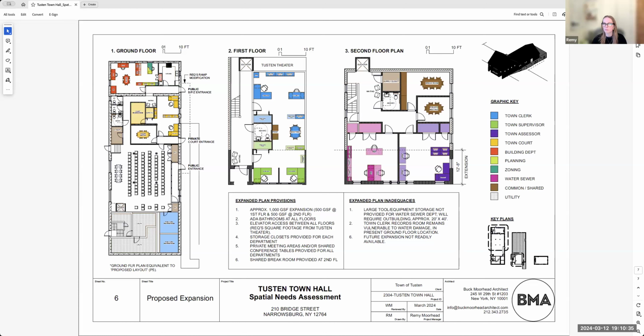Here we're not changing the use, but if you're doing a significant amount of renovation, which this would be, I think you're going to be in the code world. We could check with our code consultant. I'm pretty sure it's over 50% of the building value, or something like that. Yes, the renovation part, and then all of a sudden everything has to be pulled in and made new. Correct.